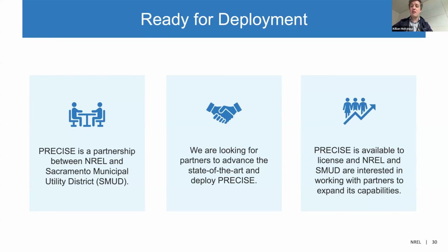So yeah, if you're using screens and everything is passing screens, then you're fine. But as you get to higher and higher levels of DER, things start to fail screens and you move into supplemental study, and that's when things start to get delayed. But Sheikh, I'd be curious if you've got anything to add there.